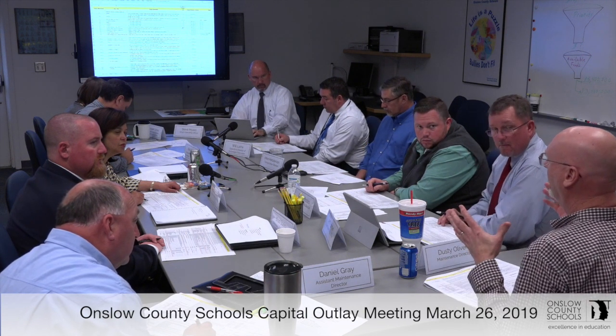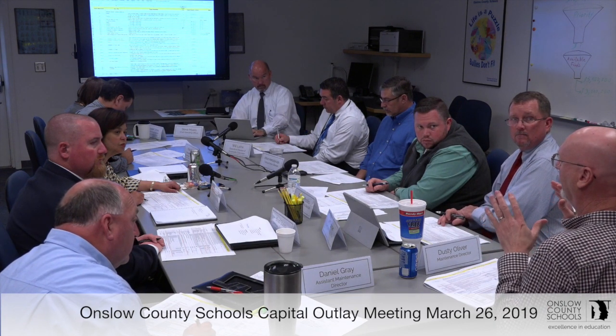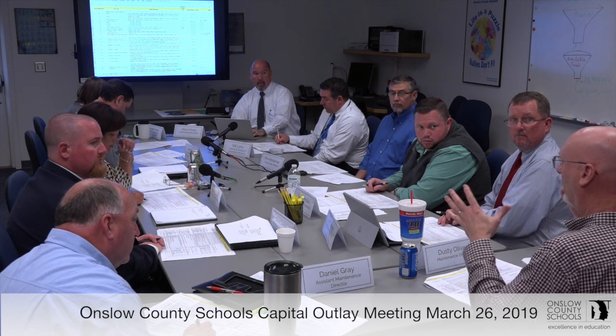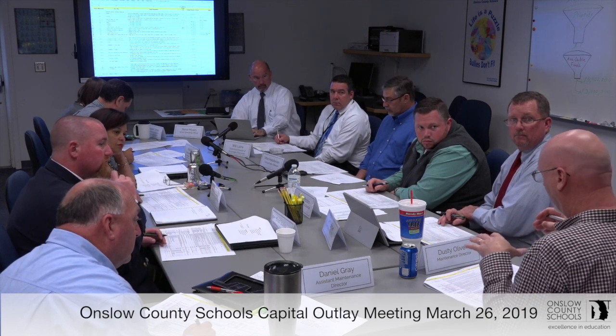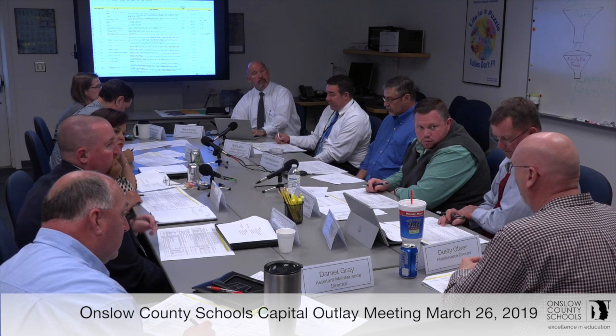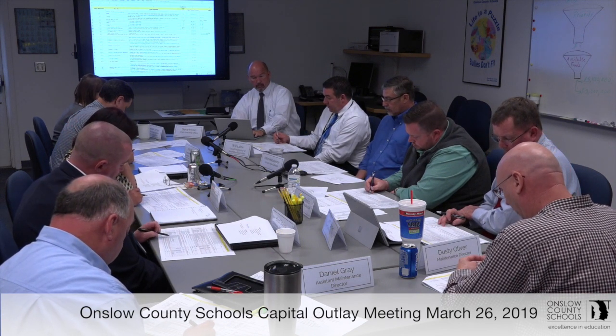And the switch gear, if that was to blow out for some reason or another, a majority of the school, the older part of the school, would be without power. We might could bring in generators on flatbeds and get power to the school while this is being replaced. It would be better to do it when the school's not being used, during the summer, if at all possible. That's a major expense.